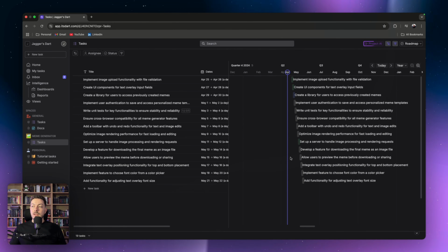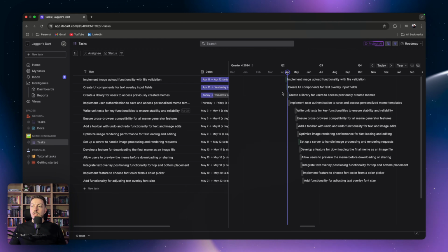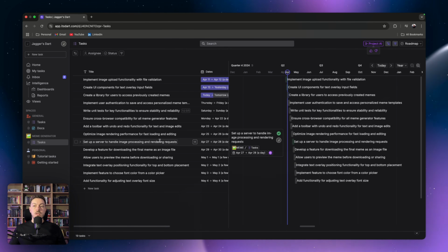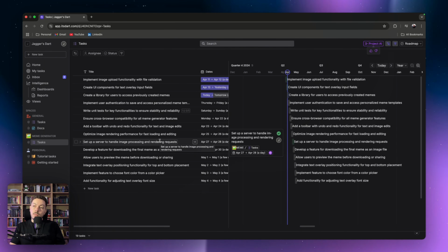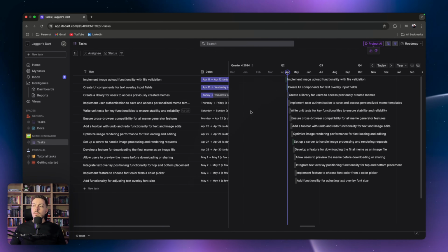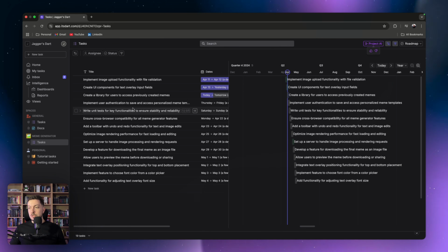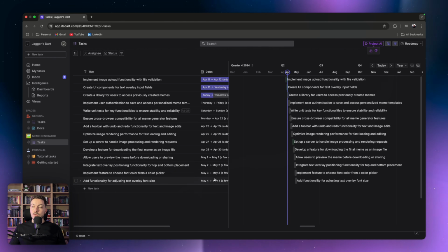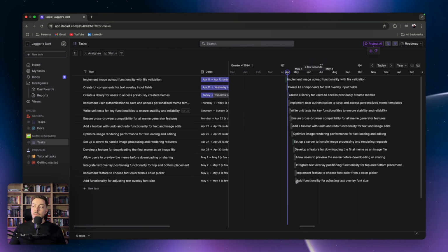And we'll start planning the project using AI. And you'll see these dates will start to change. And it will stack all of these tasks based on what the task is. The AI will look at it, understand that task, and then do its best to place those out in the best possible fashion, which you could obviously go in afterwards and say, okay, no, we'll need a little bit more time on this task, or maybe less time on another task. But it gives you a nice roadmap to start to see how could we actually fit all of this in. You can see here it's actually pushed some things into the start of May in terms of how complex some of these components might be. So I thought that was quite a nifty little feature.